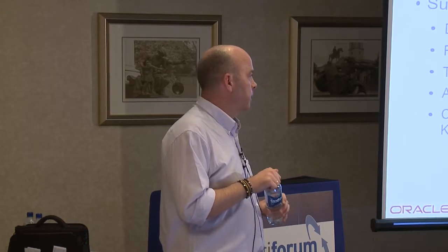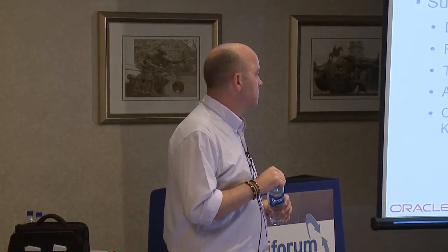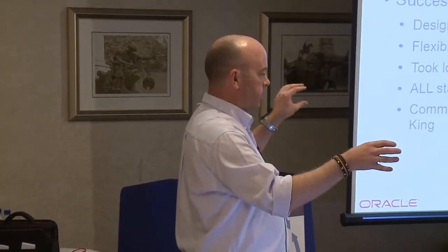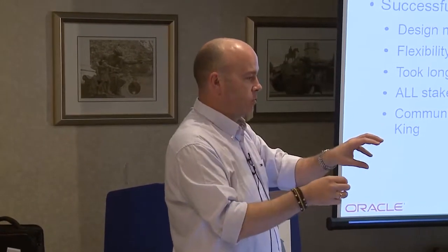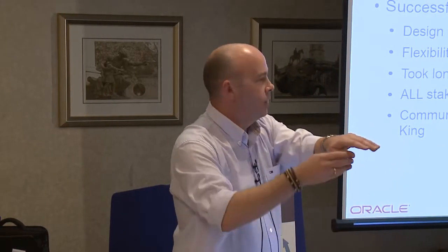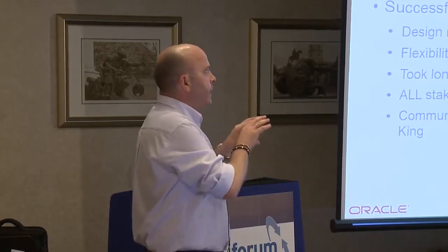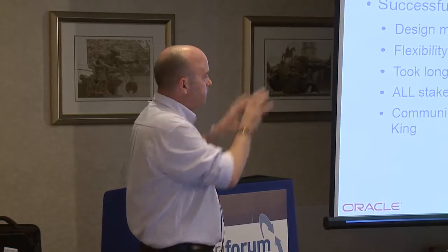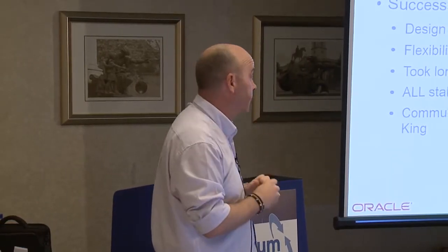Andy, I was going to ask you why the council chose to do blocks of 100. They wanted to know their expansion costs for those blocks of 100. They wanted it to be linear expansion. What they didn't want was, we can add 100, 100, 100, and it's going to cost 10,000, 10,000, 10,000, but at the 400 user mark, there's 50 grand's worth of storage needs to go in, and then you need to do something else. So we couldn't get it completely linear, but we got it as close to being linear as we could, so it can be deployed in blocks of 100, and that's pretty much the reason behind it.